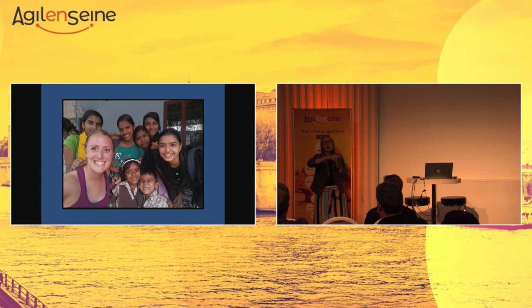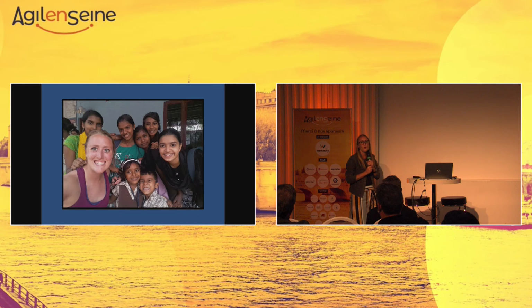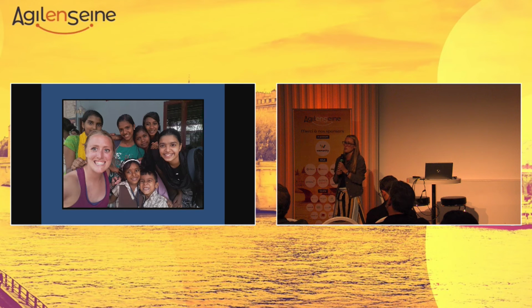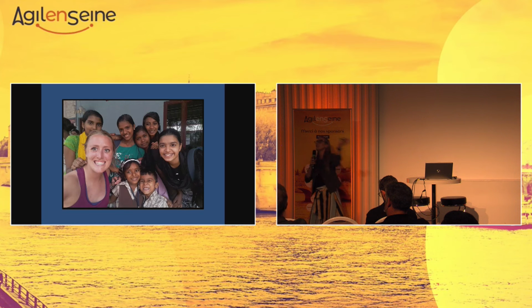So we took them, we put them into a backlog, we time boxed each of them, and then we put them into sprints. Now, whenever we did a sprint, we were able to have quicker feedback loops. So at the end of our sprint, we were able to have a retrospective to say, what can we do better? How can we improve for our next project? So whenever we went back and pulled out our next project, we were more equipped to make a difference in a meaningful manner. Again, this is not a complete overhaul.